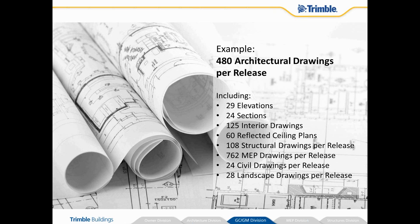There's a significant number of drawing sets that are typically created throughout the design and pre-construction phases. This example is actually shared by one of our customers, and in this example, each release contained 480 architectural drawings. You continuously need to check whether there are any differences during pre-construction to make sure that your estimate and schedule reflect the scope of work recorded in these drawings, and during construction, quickly identify and track changes so that cost and time are accounted for.